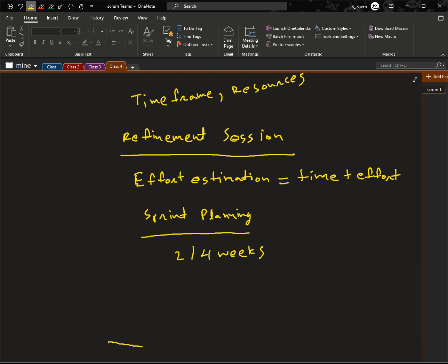So here tasks are prioritized based on the importance and dependencies. For example, in Sprint 1, the login feature might be prioritized because it's essential for all subsequent functionalities. In later sprints, the least critical features like contact us can be developed. The goal here is to establish a clear roadmap for development within the sprint.